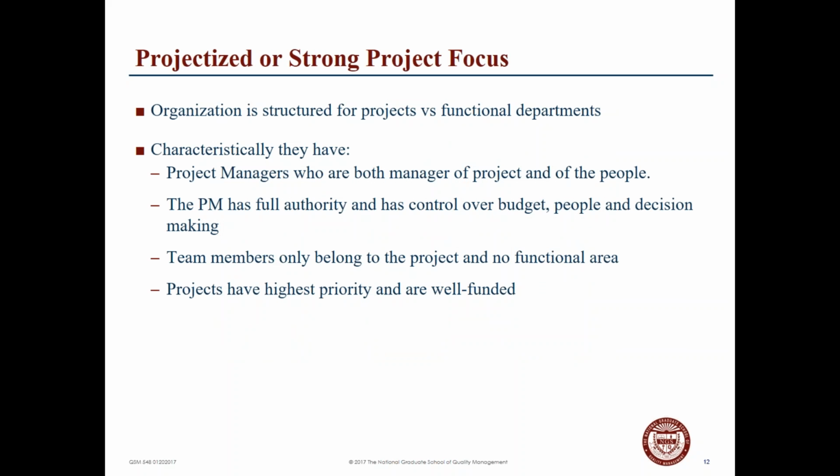If we look at it from a different perspective, an organization that has a strong project focus is more suited and more focused for assembly projects versus a functional lineup. Project managers tend to manage both the people and the project. The PM has full authority over the various pieces, the financial aspects of the budget, the resources, and has the ability to make decisions.